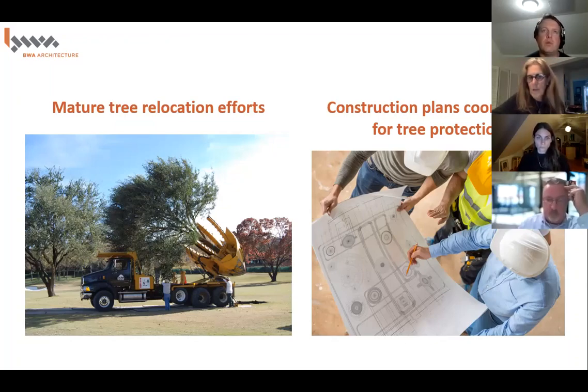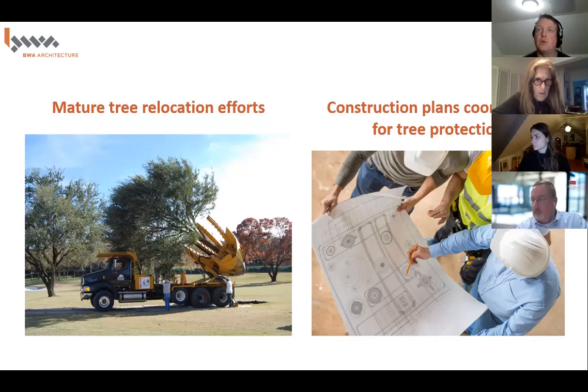But one of the most important pieces for preserving trees during construction is to have the effort properly coordinated. All the participants, including the project architects, the landscape architects, civil engineers, and probably most importantly, our contractor, whom we're going to meet in a minute, have evaluated and approved the location of these 51 trees to remain to avoid potential conflicts or construction interference.